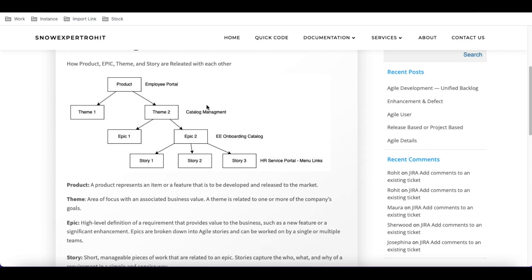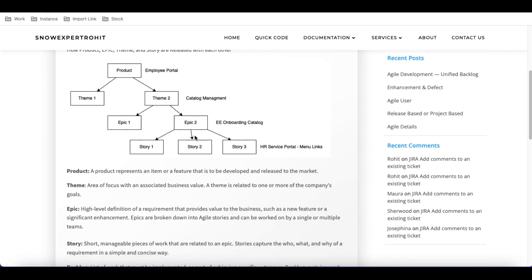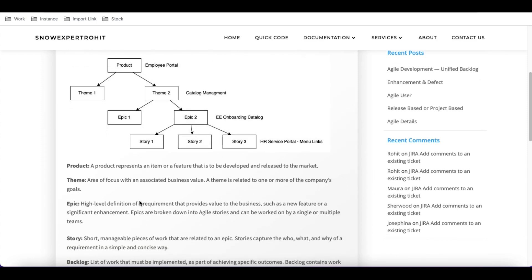After theme, the next hierarchy is the epic. An epic is a high-level definition of a requirement. For example, under the catalog management theme, you might have an epic called onboarding catalog item. There can be multiple epics under a single theme.